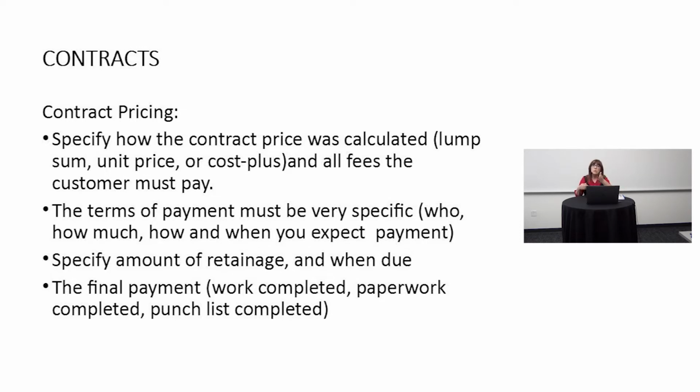Or cost plus. Unbelievably, there are numbers of times when this is a useful way for a very large general contractor and a subcontractor to do business. The general contractor says, I will make a contract with you where I will pay all of your actual costs plus an agreed upon profit margin. That's a cost plus contract.